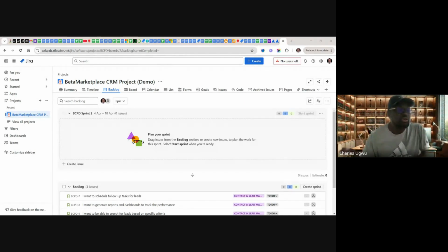So there is no lessons learned meeting or retrospective while the sprint is going on. According to Agile, I'm not quoting according to Charles, sprint retrospective can only take place immediately after sprint review.